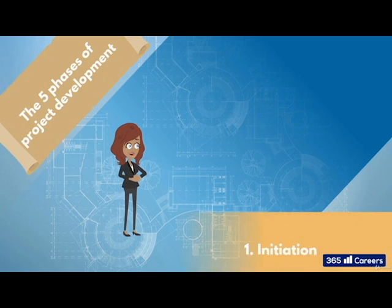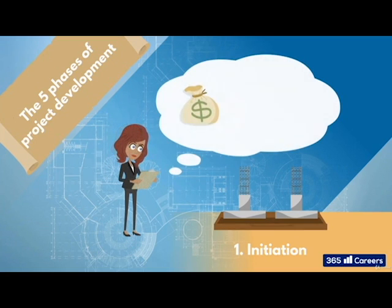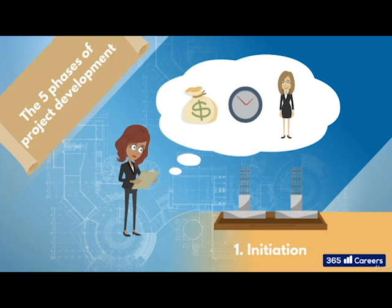The first process group is the initiation. This is where the project sponsor lays the foundations of the project. They will define the overall objective or concept, or the problem which needs resolving. They will suggest a budget and a time frame, and put all of this in the project business case. And, public service announcement for all aspiring project managers, this is also the phase where the project manager is chosen.